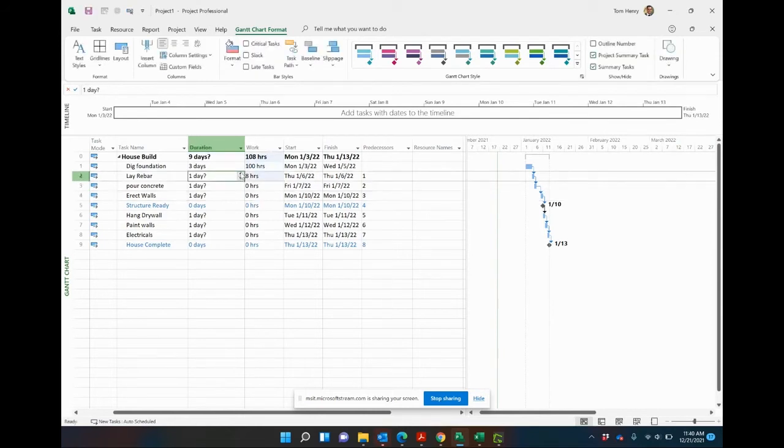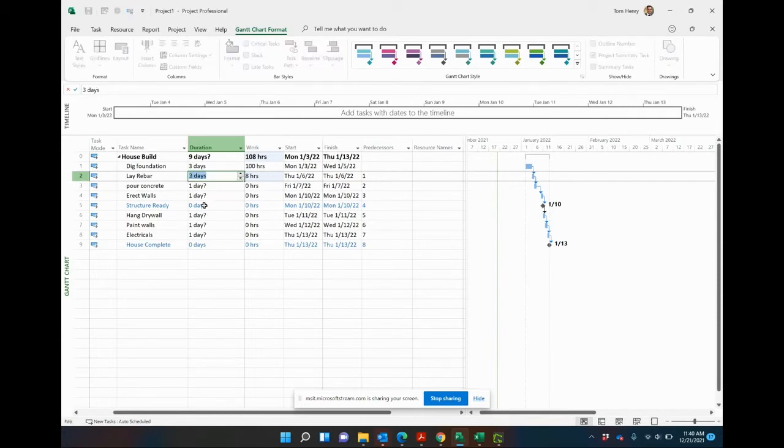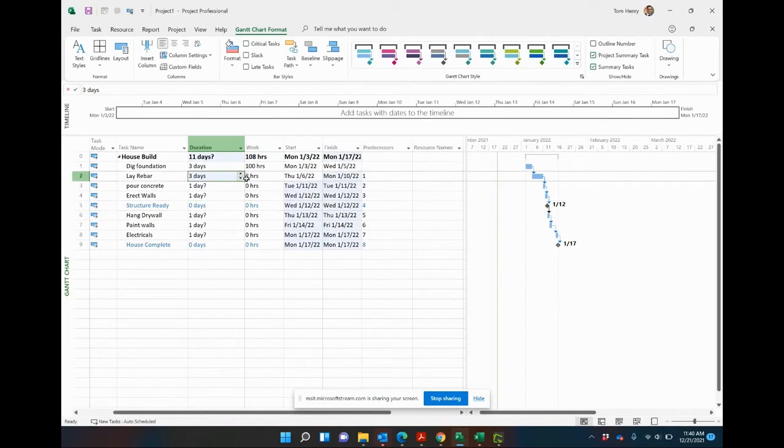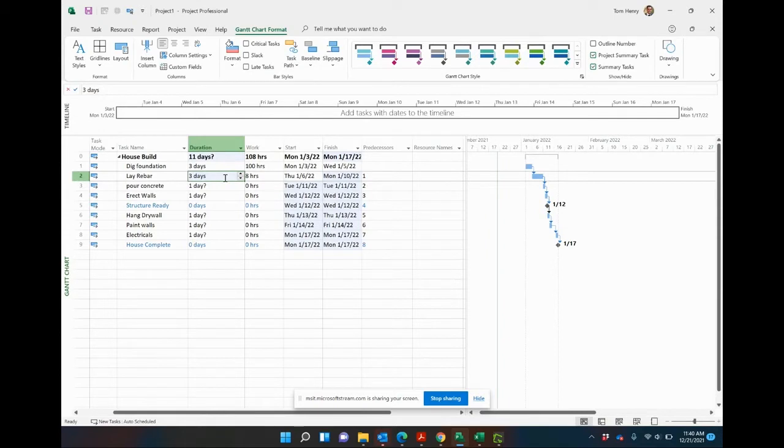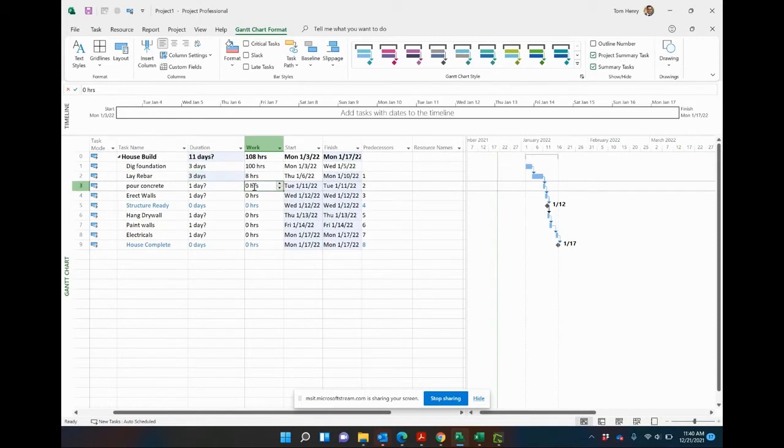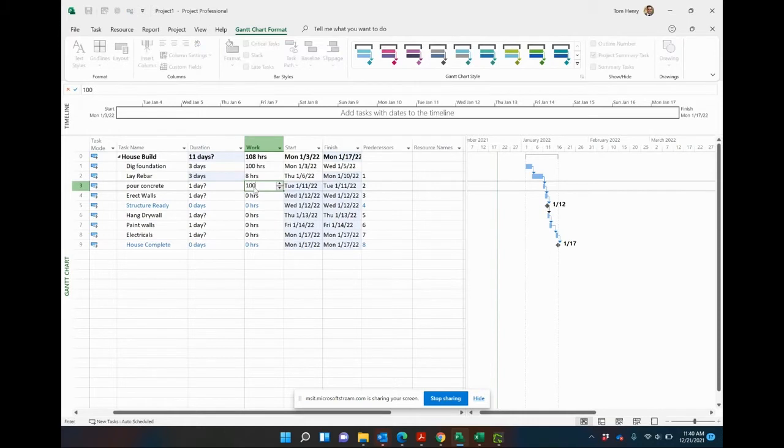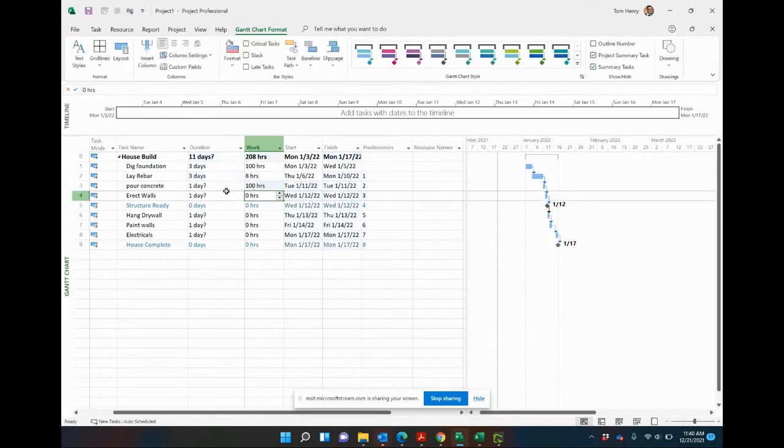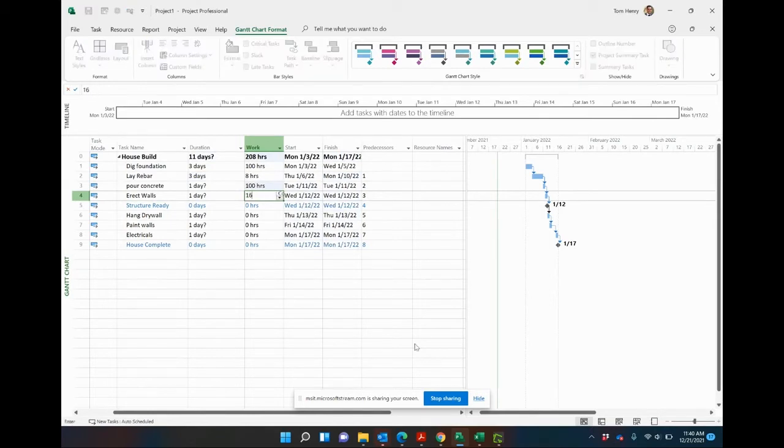Generally, you have to go in and put some in and then come back another day, and they generally do that over a three-day period. Eight hours of work, three days, you see the disconnect. Got a little bit of work going on over a long duration. This is the real world. It's really important to actually come in here and estimate not just the duration but how much effort is involved. So that's going to affect everything from how much work hours it's going to cost ultimately. Pour the concrete, you know that only takes a day but it takes four or five different people to do it. We're going to say overall it's about 100 hours of effort across the team. Erect walls, just one day but there's a crew of two to do that, so we'll call it 16 hours, maybe a little bit more if they have a bit more extra time, maybe we'll estimate it at 20 hours.